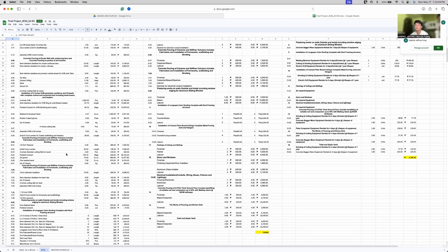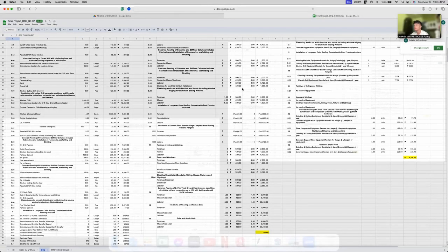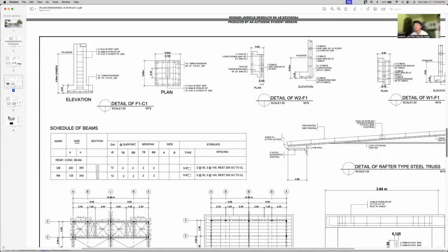So yeah, same with the coco lumber, we assume that a portion of the corners or the sides, the edges of the footing would utilize a number of coco lumber in order for it to be secured, and then vertical coco lumbers here that connect the 2 plywoods.